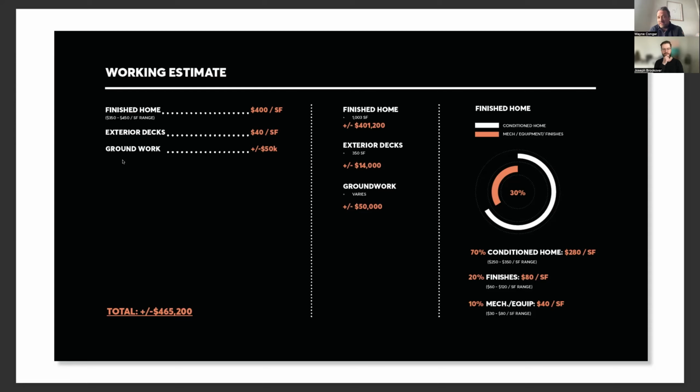It's one of our main value propositions at HUDs. And then we say, this really is the allowance. This is what we have to spend for all of the things we're going to do, whether it's very standard for us, whether it's upgraded elements, whether it's custom things like lunchbox storage walls. How do we make sure that all of that is accounted for within this budget range for those finish and fixtures allowances? And that allows us to do some really clever things because we have everything itemized of what is our upgraded and standard and value pricing for pieces.